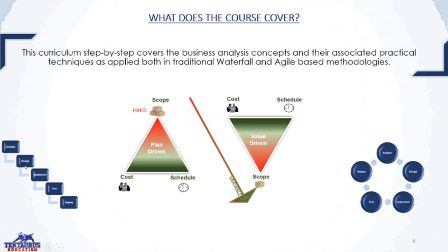In traditional waterfall methodologies, we go step by step. We start our design after our analysis is almost complete or nearly complete. So it sort of is like a cascading model. Whereas in agile-based methodologies, although the steps remain the same, they're a little bit cyclical, in the sense we take small components of a problem. Instead of taking the entire problem space and designing a long-term solution, saying, oh, it's a year and a half project with 4 months analysis and 3 months design and 6 months implementation, instead of having big chunks of work